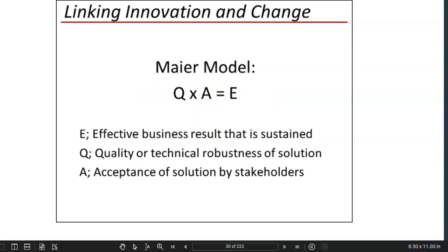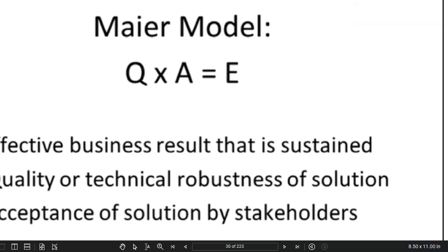But even more important than the Q side of the equation, I think, is the A side of the equation. Building user acceptance is often a piece that we forget about in a process improvement project, or we treat it as a secondary set of activities that we'll do after the implementation is complete, or just as a quick check-in before or during the kickoff of a project. Carving out time and resources throughout the lifespan of your project on ways to increase user acceptance is really important.